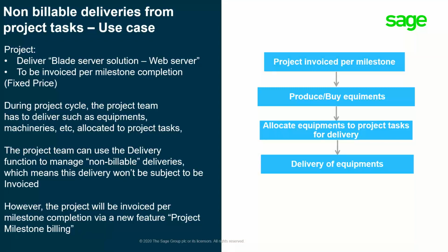However, those parts are not billable to the customer, which means that the delivery won't be subject to be invoiced, which means that the sales admin or the sales operation team do not see these deliveries in their workbench to invoice. However, the project will be invoiced per milestone completion via a new feature that I will also present to you later in this session.